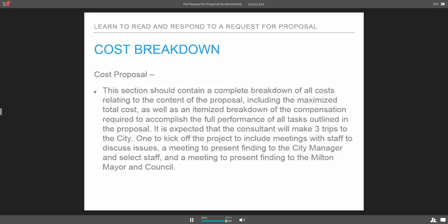But remember, whenever you respond in this way, sometimes these organizations may be looking to award the RFP to multiple vendors or multiple contractors, and if they do, then they could hold you to a particular part of that RFP. So make sure you're able to provide that first section, if that's how it's broken down, at the cost that you're proposing. That part of your cost is not built into the second or third. So if you are breaking it out on an average basis, just understand that you potentially could win part of the RFP and not the second part in your pricing structure.